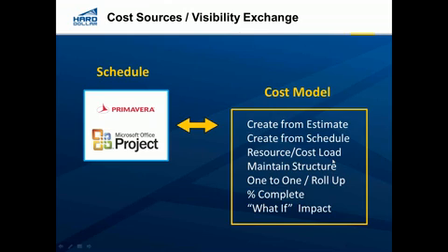Those resources, the resource libraries, the things that drive that project are in Hard Dollar, other than the start and finish dates. It gives us the ability to do a bunch of stuff from that. We can create a cost model from an estimate, so we can take a P6 schedule and then create an estimate. We also can create a schedule from an estimate, so we can create the dependencies from that point forward.